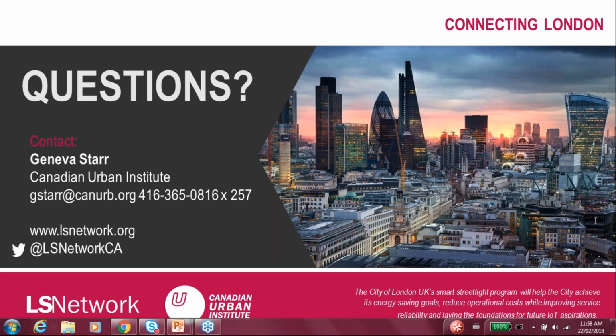Thank you. Thanks, Andy. If I can just add on to that, it's quite peculiar to the UK, but the street lighting energy costs are based on an unmetered supply. So although the project is taking 2 years to complete, through working with the City of London and their meter administrator, we've managed to implement a system so they can realise the energy savings from the installations as soon as possible. As soon as they're installed, they can actually claim the energy savings through the system. Okay. That's a great point. Thank you.